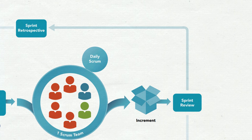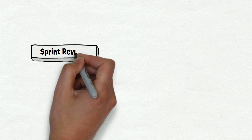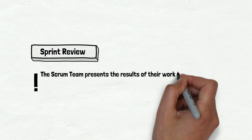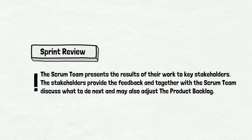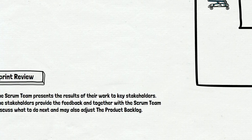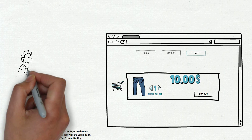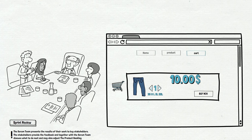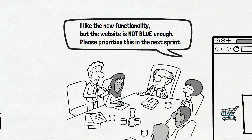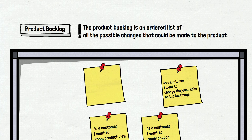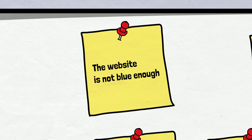There are two more items on the schema — both of them are meetings. The first one is sprint review. The Scrum team presents the results of their work to key stakeholders. The stakeholders provide feedback and, together with the Scrum team, discuss what to do and may also adjust the product backlog. The dev team finished the increment and demonstrated it to the stakeholders. They can change priorities for the next sprint or have new ideas related to functionality or UI. The product owner will update the product backlog based on what was discussed at the sprint review meeting. In our case, we have a new highest priority story.